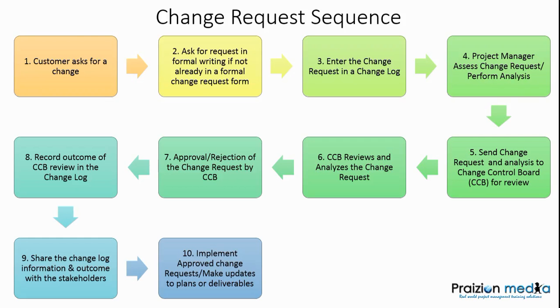Remember, approved change request is an input to direct and manage project work, and at the same time, it goes to control quality. I talk about all this in a different video, but the reason is as you are carrying out an inspection, you want to make sure that what you are inspecting aligns with the approved change request. Approved change requests, like I said, are also an input to direct and manage project work. So please be aware of that.